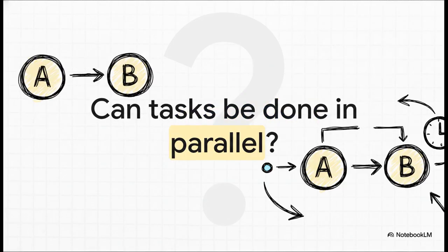And the last big question is about challenging your own assumptions. Look at the lines you drew connecting all those tasks. Do UI design and backend development really have to happen one after the other? Or maybe the backend team could get started with just the basic wireframes. See, every single task you can move off that one-after-the-other serial path and onto a parallel path is a chance to shorten your critical path and finish faster.